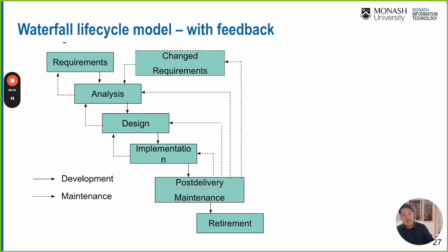But what happened is that it delays the whole process, right? Because we need to go back to the beginning of the step. Requirement is changed. Okay, we start from the software analysis again. What is a new functional requirement? What is a new non-functional requirement? Is there any design that we need to change or not? Any class diagram, any object that we need to modify? We need to repeat every process again, which is really time consuming and costly.